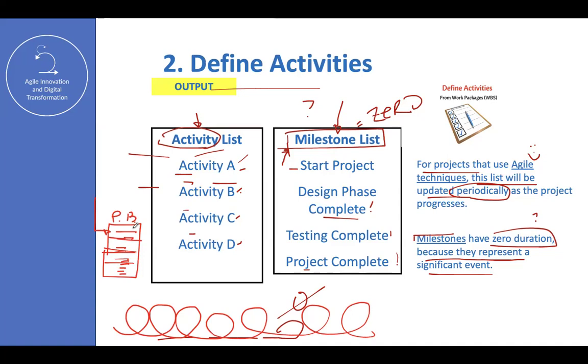At the end of the sprint, you will be able to change whatever, but in the middle of the sprint, you cannot change anything. If Alice says I need to put this new feature in the product backlog, okay, no problem, because we're going to prioritize the list at the end of the sprint.